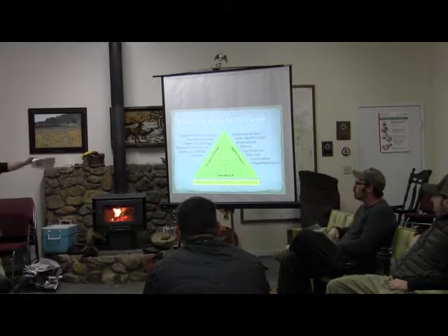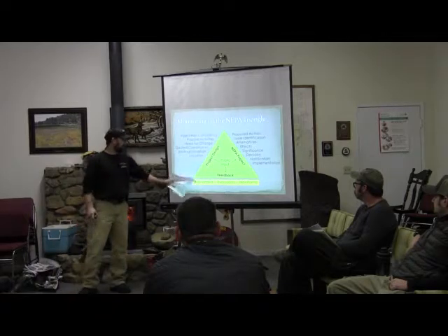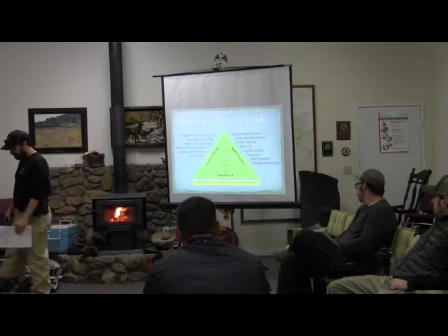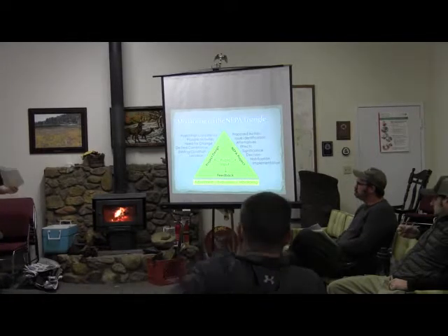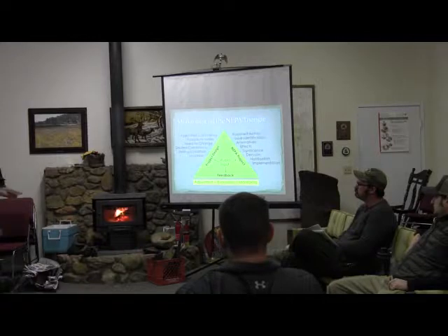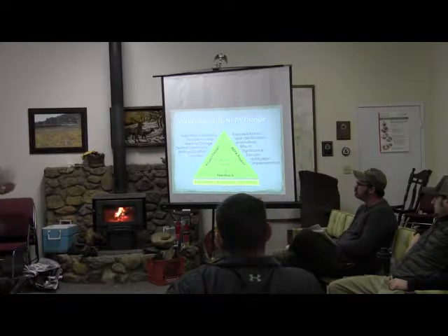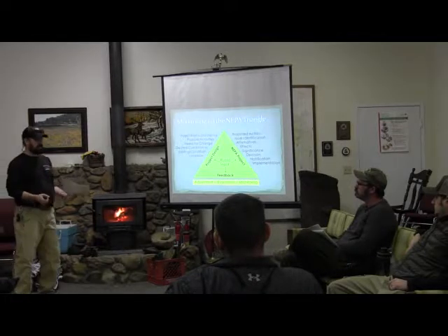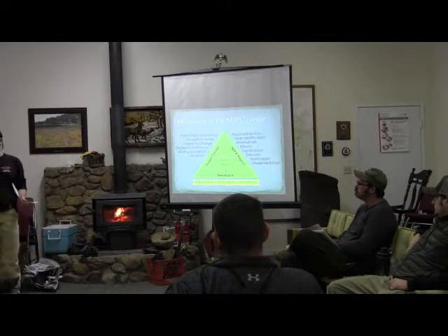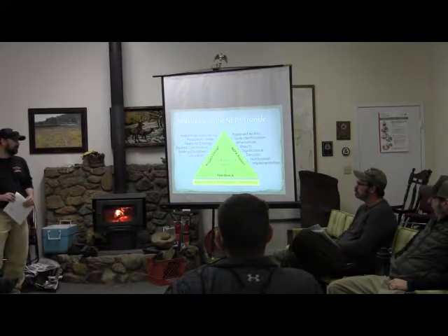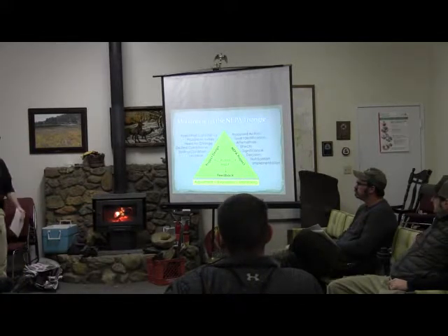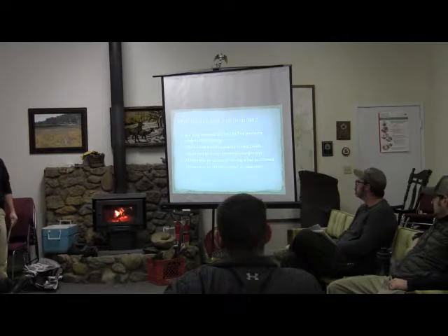There are also aspects that go into feedback and adjustment. This is the adaptive management process. If you're doing active adaptive management in your NEPA, in your project implementation, it simply means you give yourself flexibility in the NEPA, where you can start implementing something, and if it's not working out, you can monitor it. It always requires monitoring, and then you can make adjustments. Maybe the piles that are 10 feet need to be 5 feet, or maybe they can be 15 feet, that sort of level of changes. Then you evaluate and monitor it. But it's super important to do monitoring.